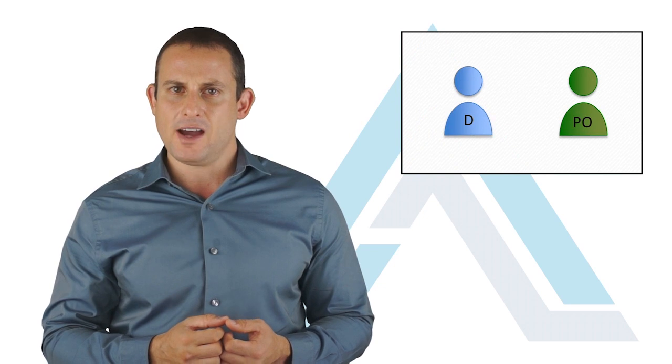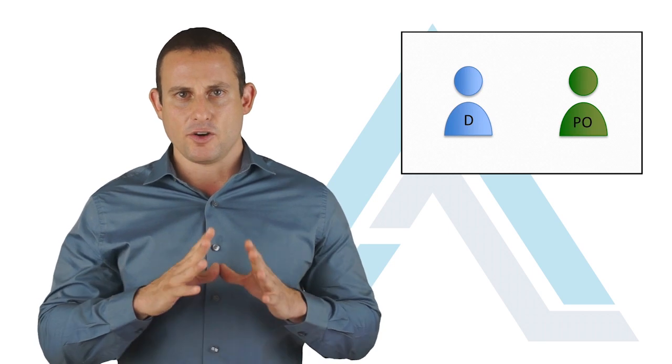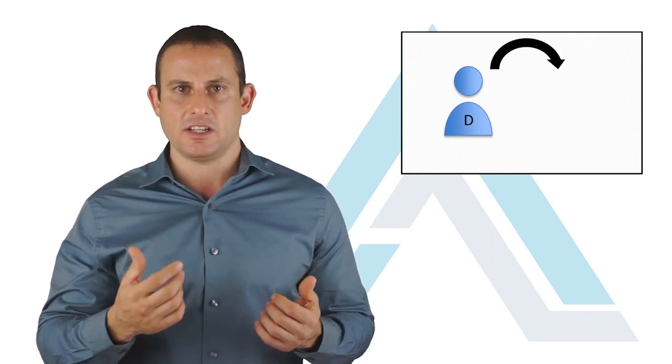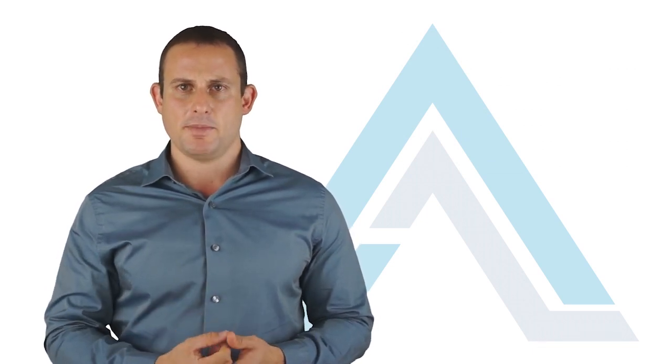An absent or unempowered product owner holding up key decisions. Product owners should be available throughout the sprint to field specific questions about the focal product backlog items. If they are regularly absent or constantly having to seek approval from elsewhere, the development team might find itself paralyzed with uncertainty. Unreliable suppliers. This is possibly one of the most frustrating impediments due to the lack of control that the Scrum Master and team might have in dealing with an overburdened supplier. Poorly supported components or add-ons can lead to black holes that can seriously suck time from your sprints.